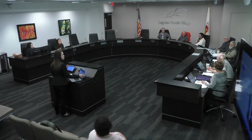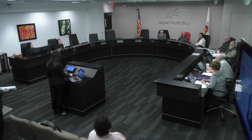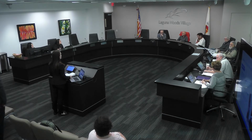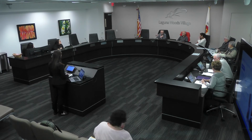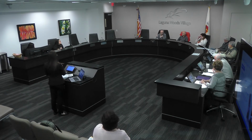Another question? Who has another question? Just for clarification, it's been my experience, Edison has always done that. You give them your loads, they will tell you if the transformer is adequate, and if not, they will upgrade, and they will give you a cost for that upgrade. Everything's not free. If the conduit is fine, they will provide the primary cables. You're responsible for secondary, and that's always been their policy. Yeah, okay, well, the thing right now is, once we come up with strategic locations for these EV chargers and ask them to provide the excess capacity, we'll discuss whether or not we pay for it or they pay for it.